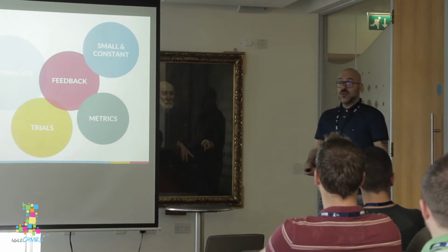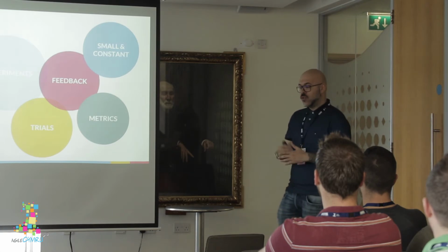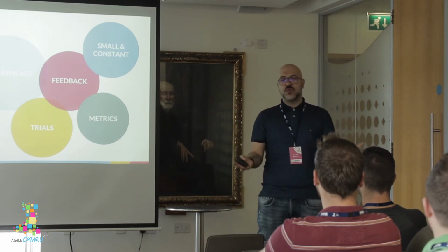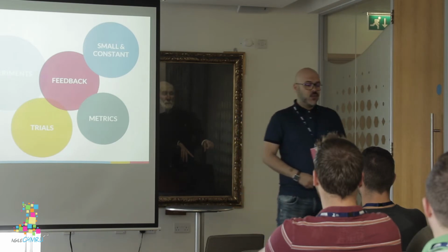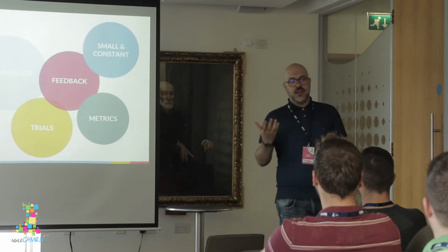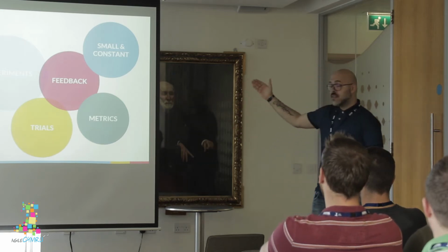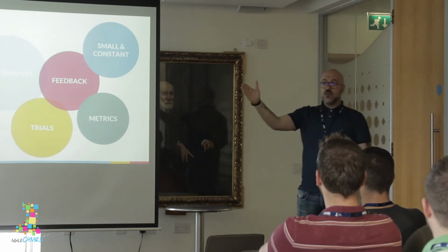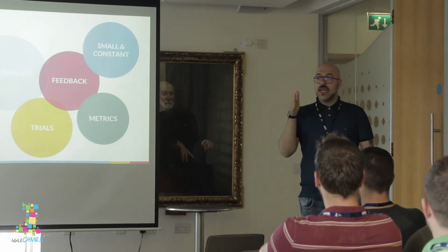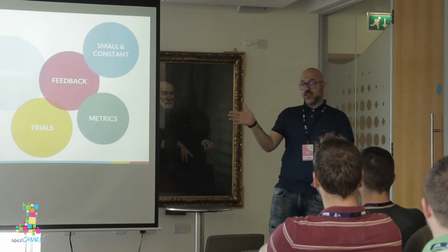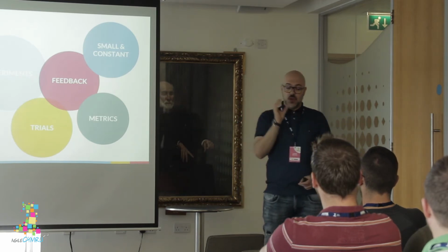And we started with an iteration of 2 weeks. So we started to create our software, but we realized quite soon, after 2 sprints, that we weren't able to provide the value that the company was asking us. So what I suggested is, okay, let's take it small. So let's move to 1 week iteration. And in that case, we achieved exactly what the company was looking at.